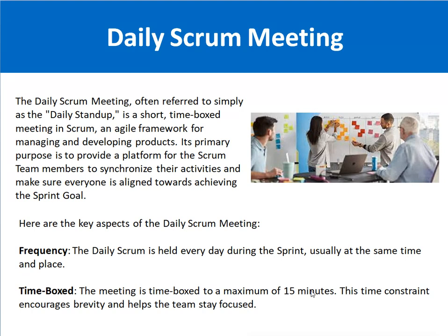Next is the time box. The daily Scrum meeting is generally a maximum of 15 minutes. It should not be of more than 15 minutes. It should not be a case that people are just discussing things and not utilizing the time properly.